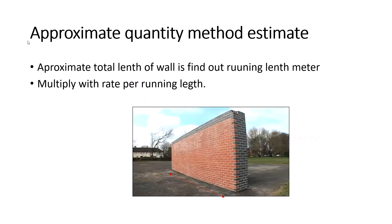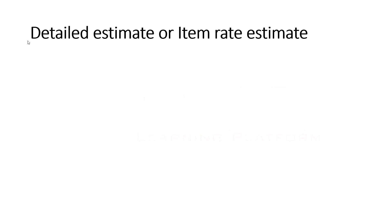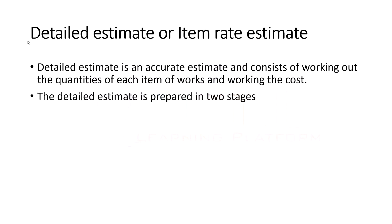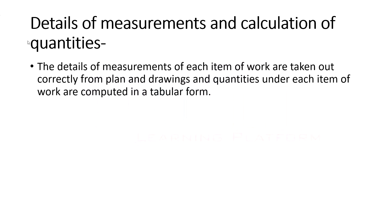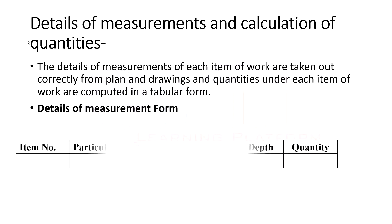The detail estimate, or item rate estimate, is an accurate estimate. It consists of working out the quantities of each item of work and calculating the cost. The detail estimate has two stages: stage one is the detail of measurement form, and stage two is the abstract of estimate form. The detailed measurements of each item of work are taken correctly from plans and drawings, and quantities under each item are computed in a tabular form.